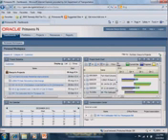You can see this dashboard is filtered by a portfolio, which is essentially a group of projects that I created, which is just called Sharon's projects, right? So you can create a portfolio manually just by saying, I want this project and this project to be included. Or you could create a filtered portfolio by saying, create a portfolio that's all projects that have Joe Smith as the project manager.